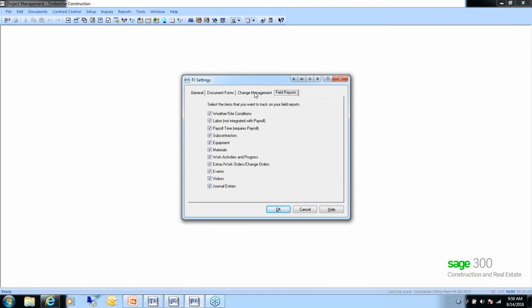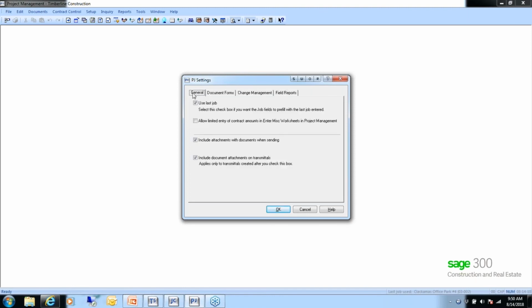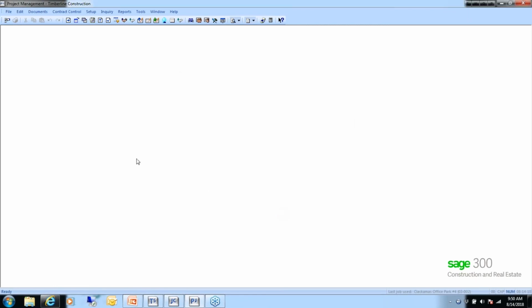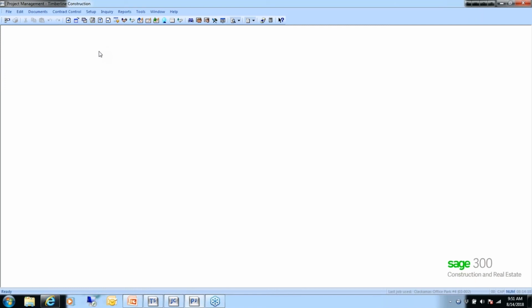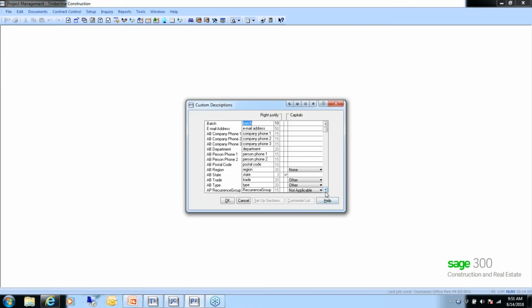Now, down below, we have the categories, default categories for each of the 6 cost types. And this is for lump sum pricing. So again, for it to pre-fill, you can use the drop-down. This is going to give you your list of standard categories. Now these can be overridden at the time that you're entering in the change order or the change request. So these are just going to be the defaults that it's going to pick up.